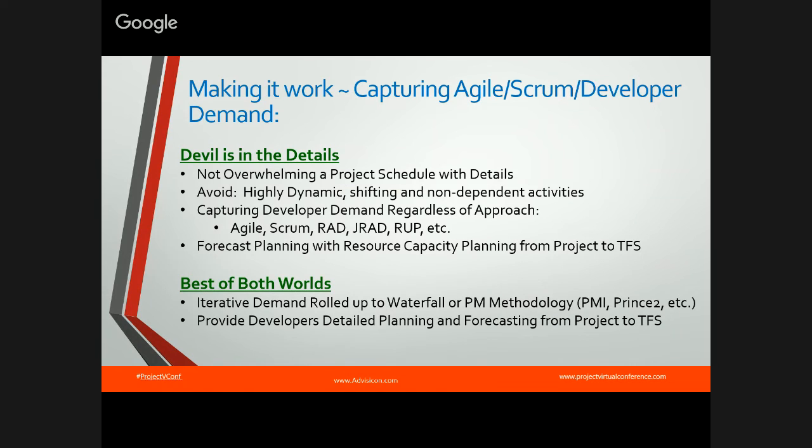It's important to understand that these are databases, so you want to align columns. If you're in Visual Studio and you want to track your story points or actual hours, or you need to synchronize your resources, there are elements that need to be the same. In many cases, this is where we will define our custom fields, or you'll use some of the standard templates that are out there to help you manage and track these better.